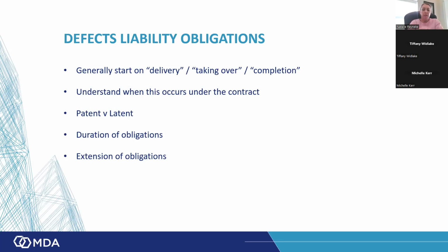Also, just a quick discussion on patent versus latent. So latent defects are not defined in South African law. In other words, it doesn't say that for this specific item of work, there will be a 5-year latent defects liability period. For example, in your codified legal systems, it'll say that for civil works, it must be 10 years, for mechanical works, it must be 8 years or whatever. So the latent defects liability period is actually specified. So you'll see, for example, in the JBCC, we have a latent defects liability period of 5 years, but you don't see it in the FIDIC.